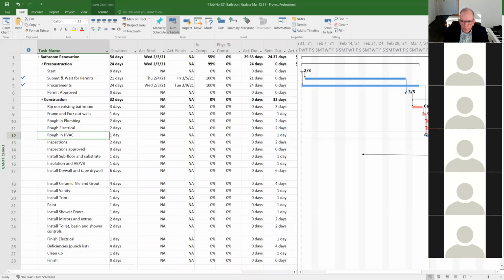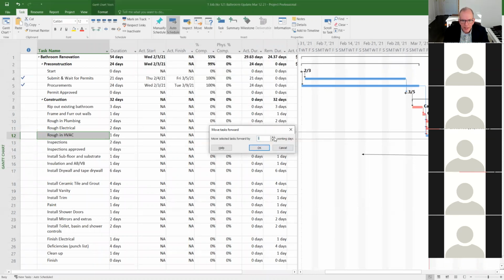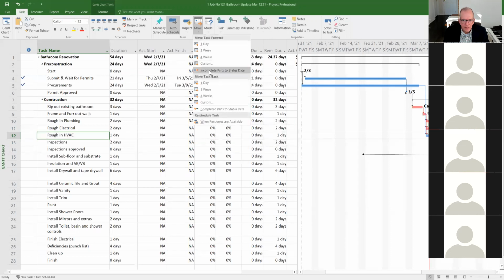So you see how it's on the Friday? They didn't show up. It's Friday night. That's about the best time to update the schedule, right? I'm going to say they're going to come on Monday. I could pick any time. So just so you know, I could go custom, and then it wants to know how many days, right? I could say they're coming next Friday, so I could select 5, so on, right? But I selected incomplete parts to the status date.